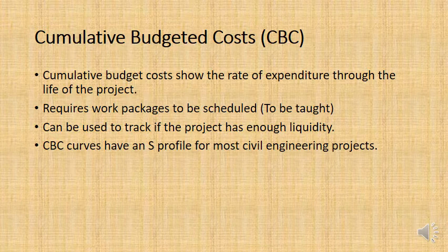But over 10 weeks, it's going to cost you $100,000. That means it's going to cost you, let's say, $10,000 a week. Now, does the project team have $10,000 in capital to pay all of its costs, to pay the suppliers of materials, to pay the subcontractors?